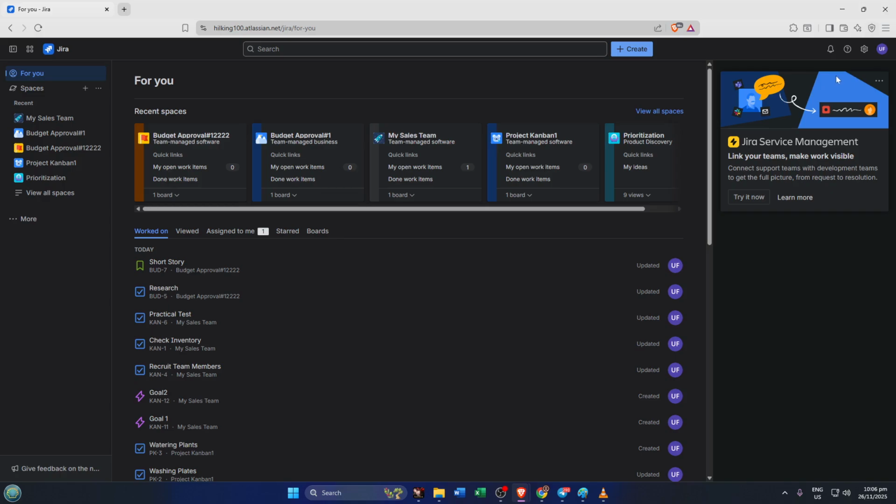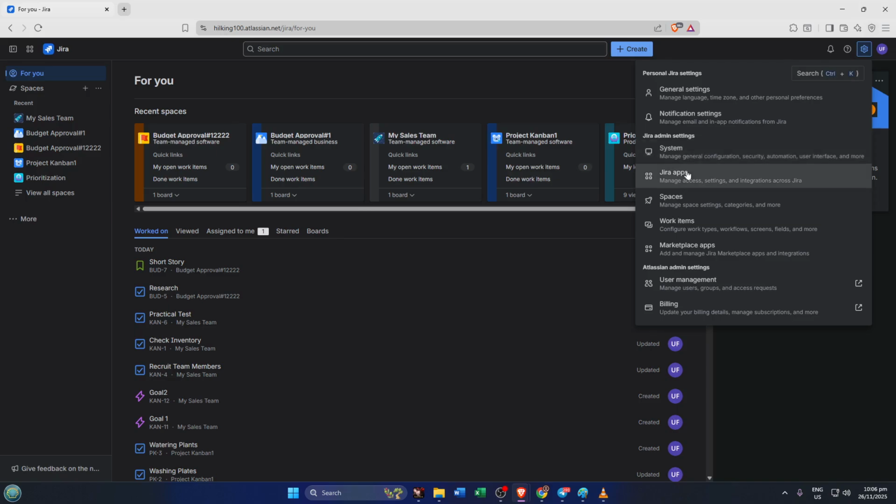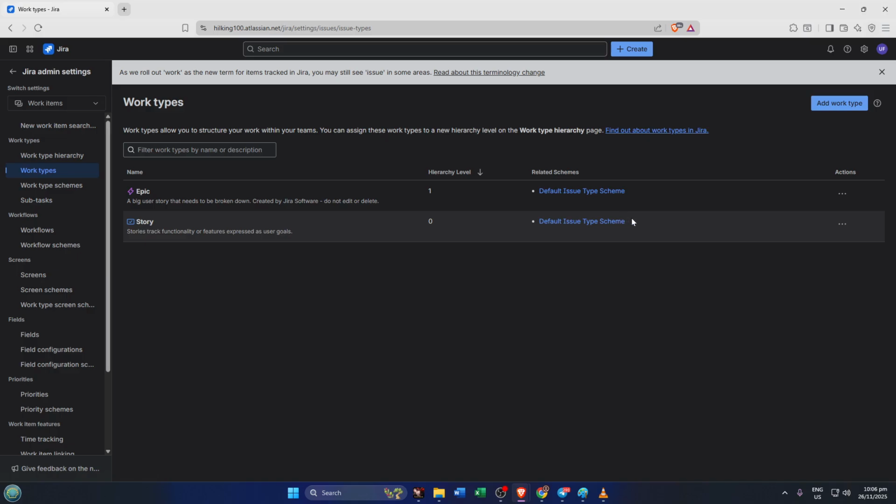To do that, head over to your project settings. Once you're in, look for the section called Issue Layouts. And here, you'll want to select a story issue type configuration. Think of this step as double-checking that your board has the story points fuel gauge installed where you need it. Sometimes, especially in older or customized Jira projects, the story points field might not be visible, so don't skip this. Making sure it's enabled keeps your estimation process smooth and central to your workflow.